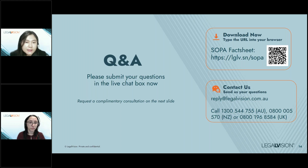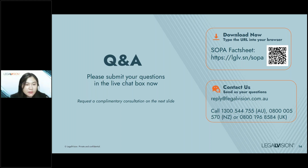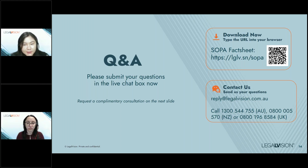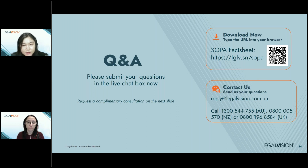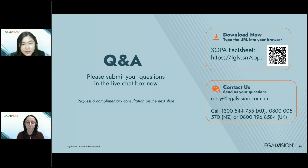Question: What if I issued invoices that don't comply with SOPA? Can I reissue a payment claim for the same invoice? The short answer is yes, but there's a time limit. You have up to 12 months from the date the works were last carried out. If you have a defect liability period of, for example, 12 months under the contract, then you can add 28 days — meaning you have 12 months and 28 days to make a claim. Contracts cannot reduce the 12-month period allowed by the legislation.